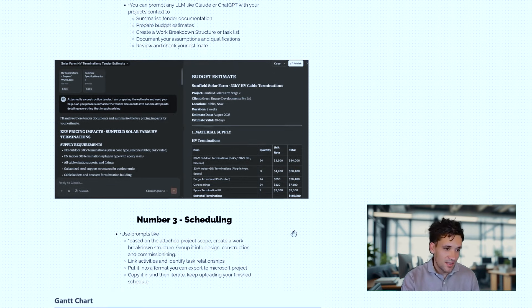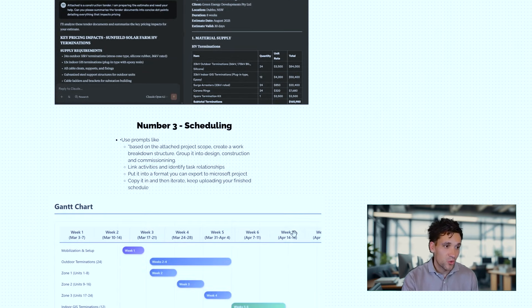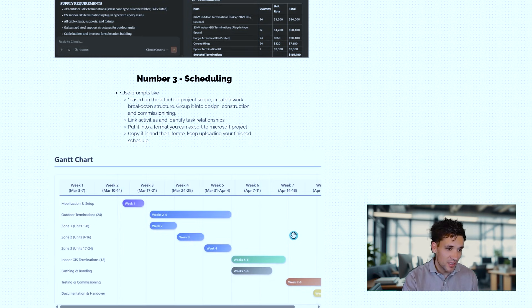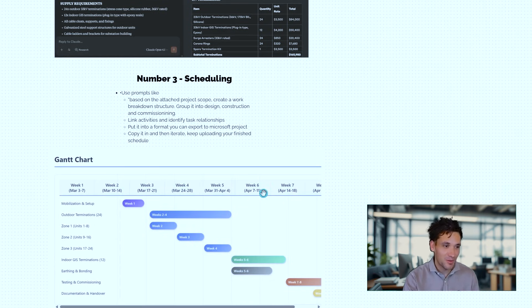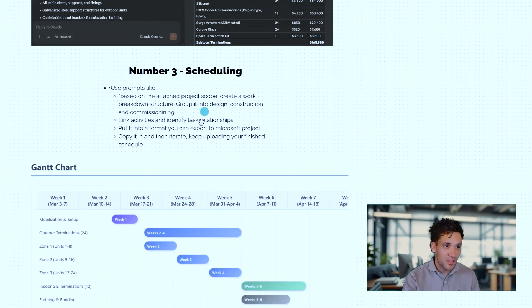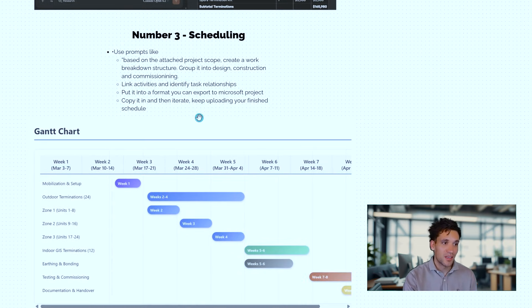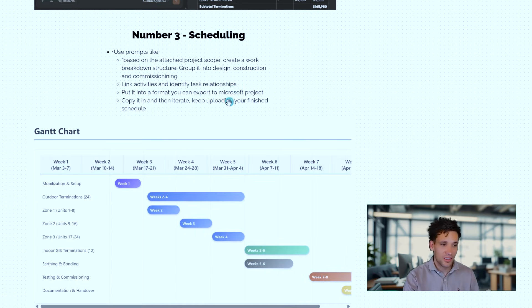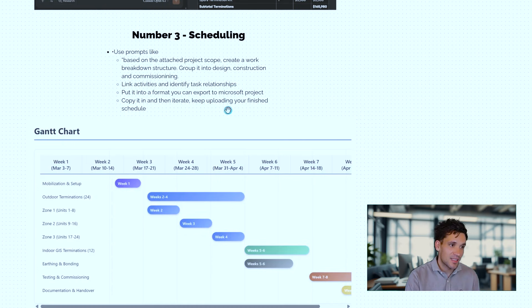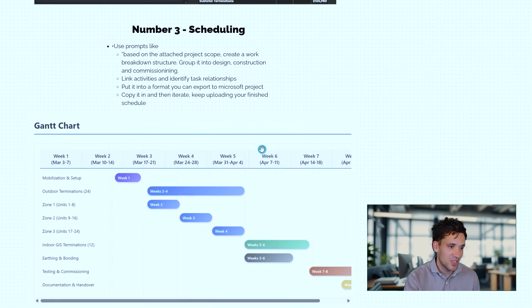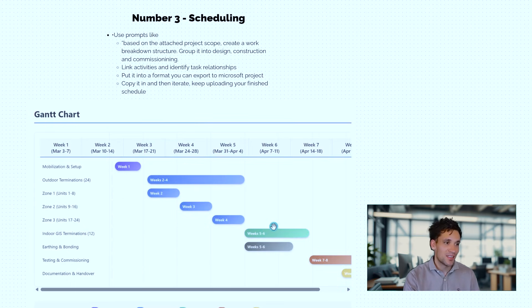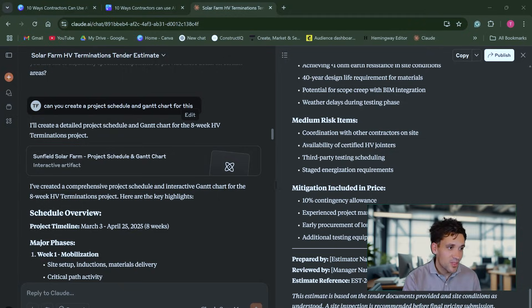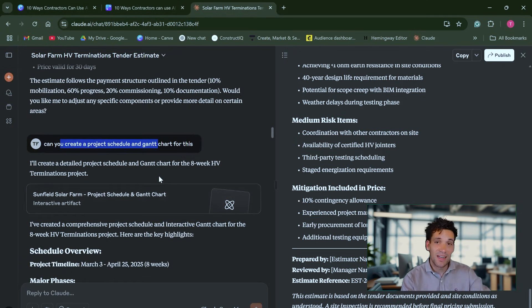The next thing we can use these large language models for and AI tools is for scheduling. And when I was researching this video, I was actually a bit shocked at how incredibly powerful these tools are at scheduling. So based on simple prompts, like based on the attached project scope, create a work breakdown structure, group it into design, construction, commissioning, link the activities, put it into a format you can export to Microsoft Project or just the generated Gantt chart, Claude actually went and generated a fully interactive clickable Gantt chart. Based on this simple prompt, can you create a project schedule and Gantt chart for this project? Again, I've previously given it the project context when I asked it to prepare the estimate.